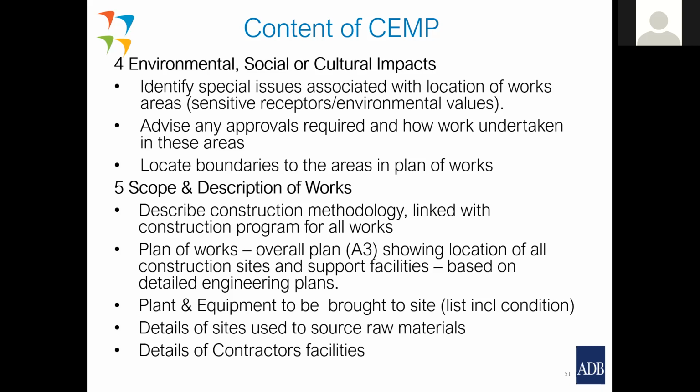Section 5, a scope and description of the works, describing his construction methodology, including construction method statements for the site-specific plans. And this will be linked to the construction program for all the works. So you see he'll have an overall construction program that he is following, and this should be included as part of the CEMP. He should show a plan of the works, and at least an A3 plan showing a location of all construction sites and support facilities based on detailed engineering plans.